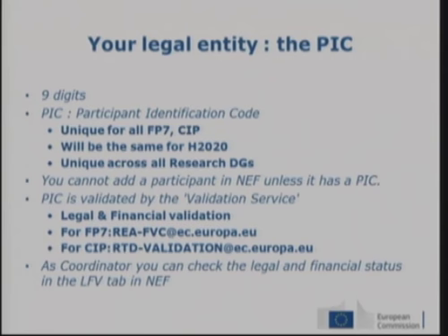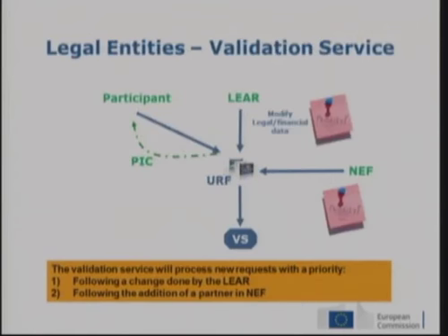Some basic rules for amendments: try to react quickly. Send an amendment request as soon as you see that you require it. Once we open the NEF session for amendments, also try to complete the information as quickly as possible. As it says here, the data should be ready by the time the request is submitted to the Commission. And there is one important rule to remember: an amendment cannot be launched during the periodic reporting session. For NEF, it is not possible. So you want to do the amendment first, finish your periodic reporting session, and then you will be able to do the amendment.